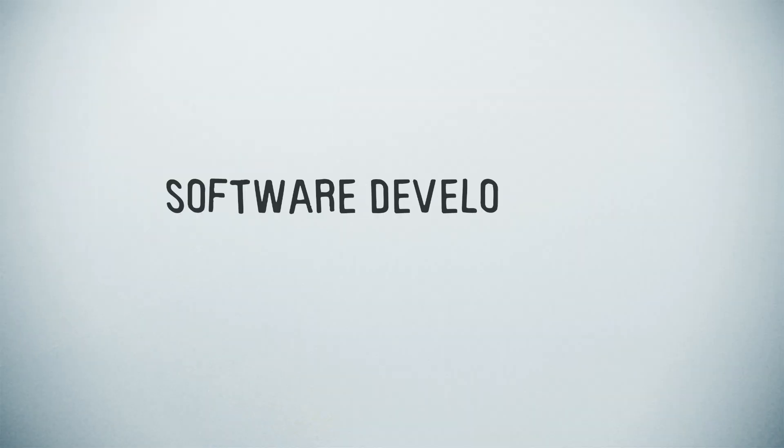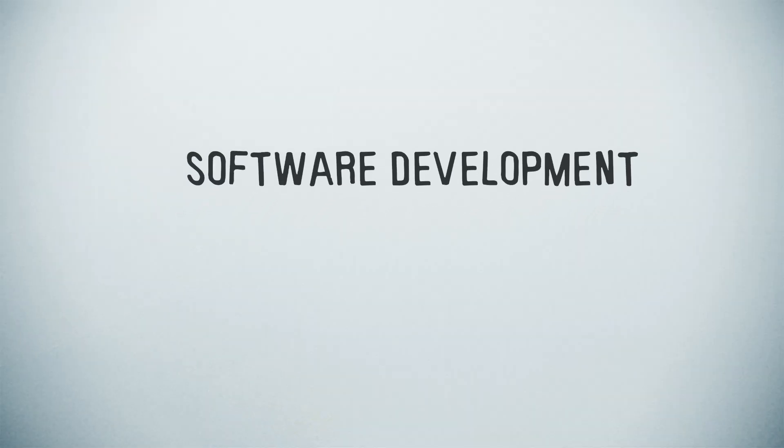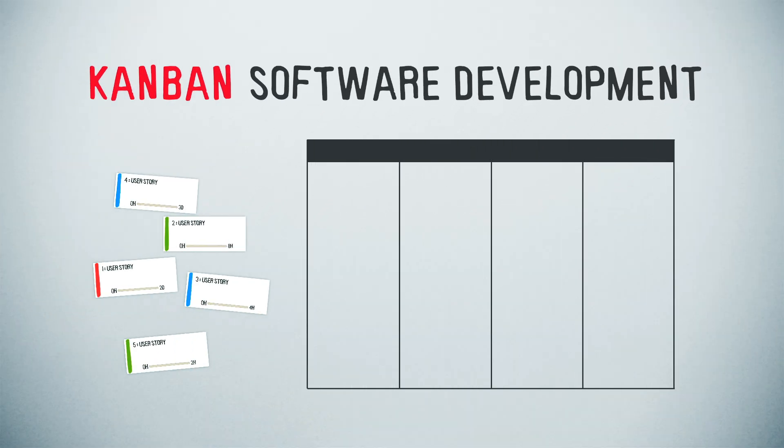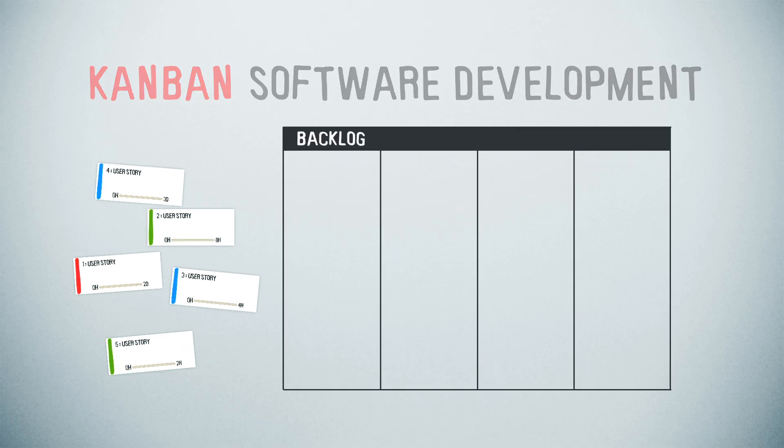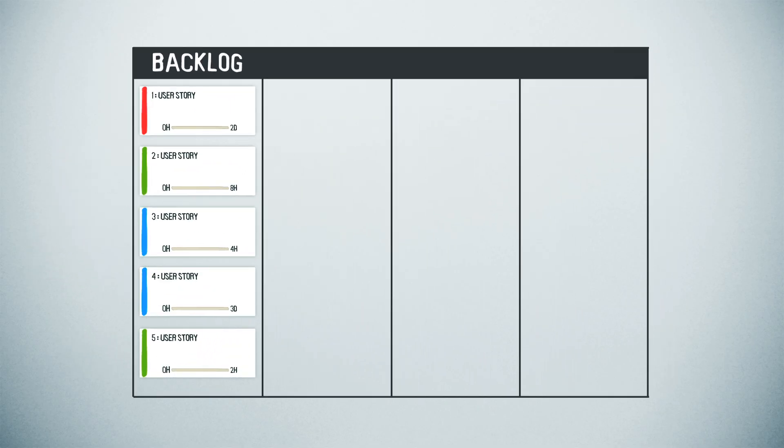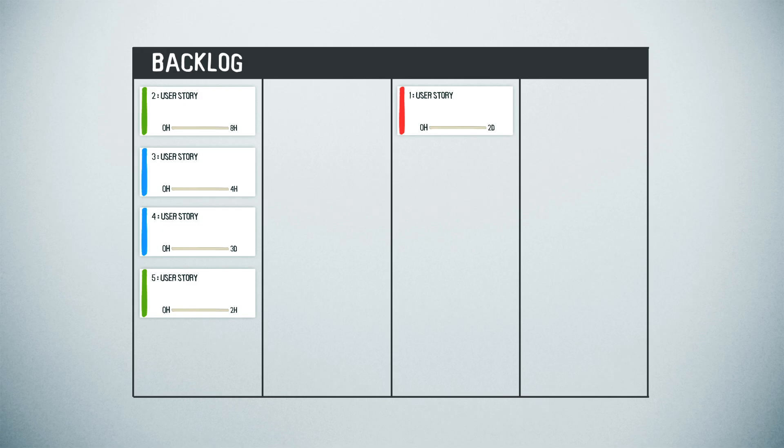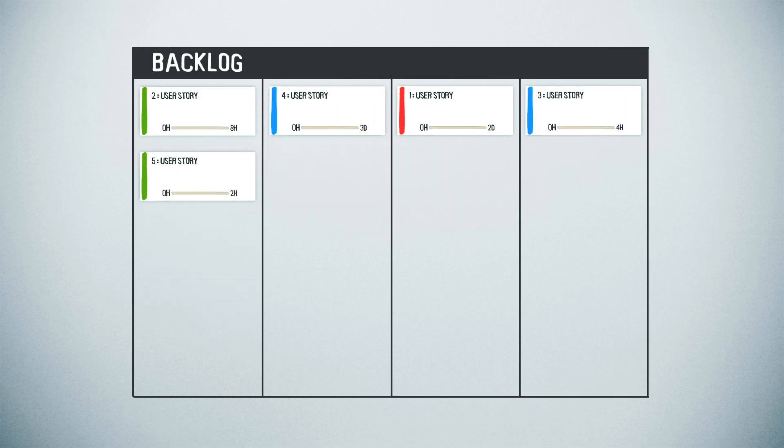When adapted to software development, Kanban systems usually start with a board and visual cards that represent items in your product backlog. On the board, you place the cards into columns that represent their current step in the workflow, ranging from new to complete.